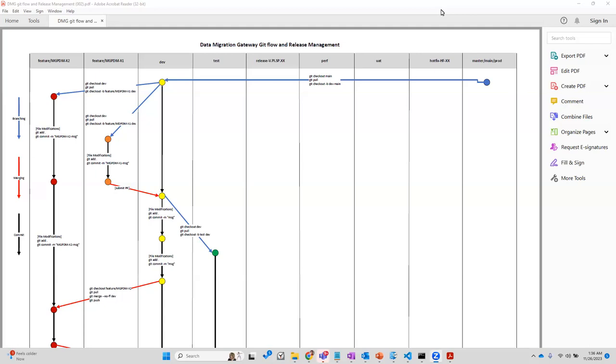So in each epic there are some stories. Okay. So there will be stories and sub-stories within stories. When the sprint starts, a discussion meeting happens, which is called sprint planning. In sprint planning, it is asked, okay, do you want to take this story in this sprint? What is the objective of the sprint? My objective in this sprint is to build connectivity. What are the stories associated with connectivity? Those stories are taken into the current sprint.